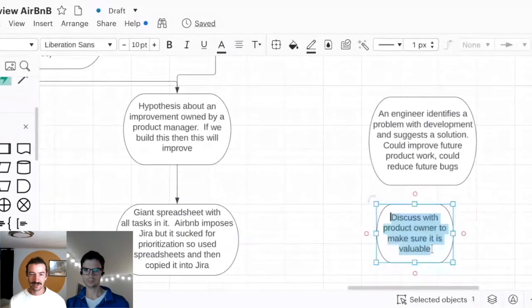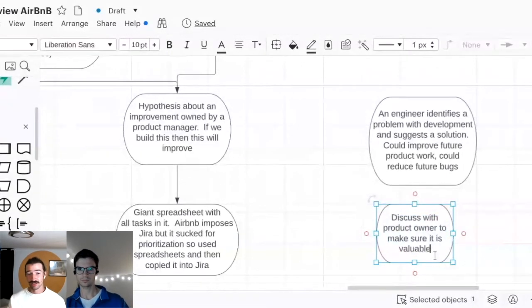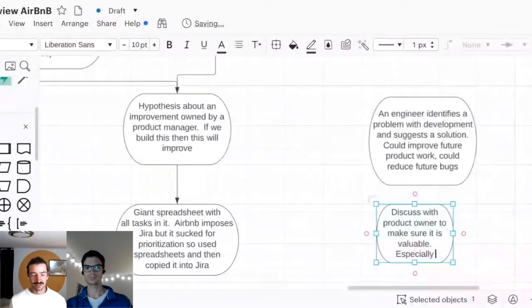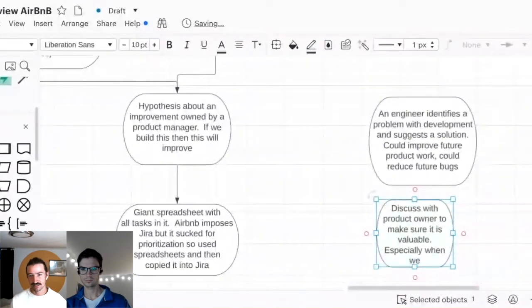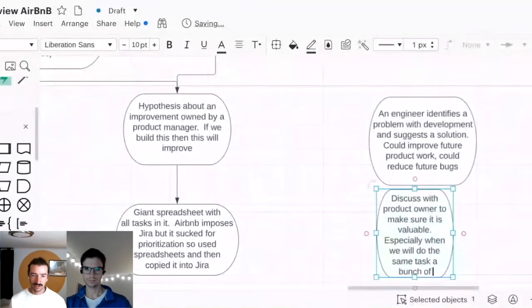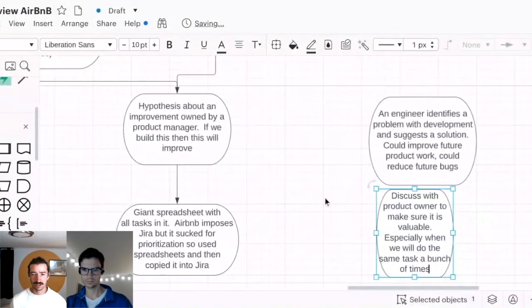But if they do think it's potentially worth it, because you might do that kind of work again in the future, or maybe that page is really important, and it's bad that we can't easily change it, then you're going to scope it out. You're going to write not a super detailed, but a fairly thorough investigation of what would go into fixing this and how hard it would be.